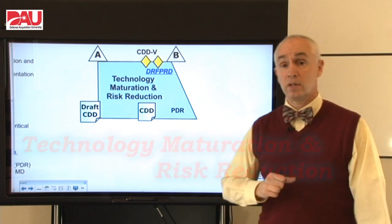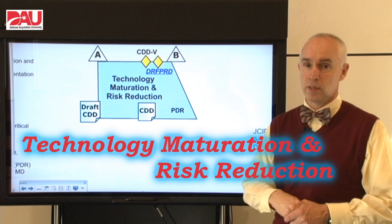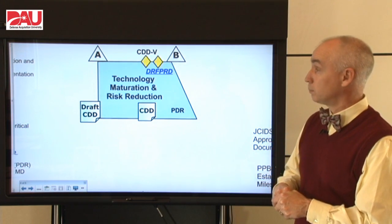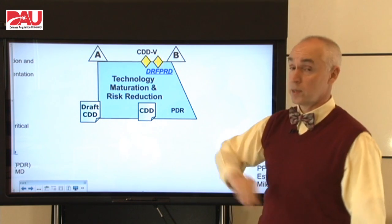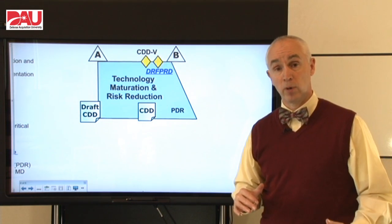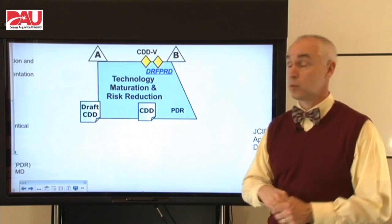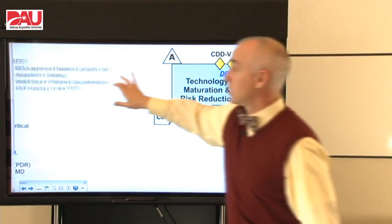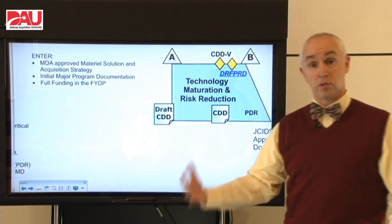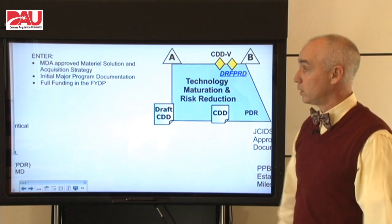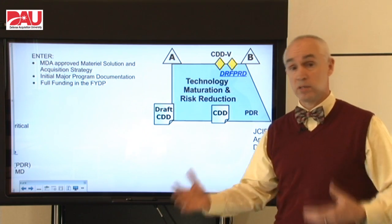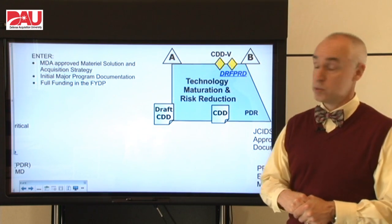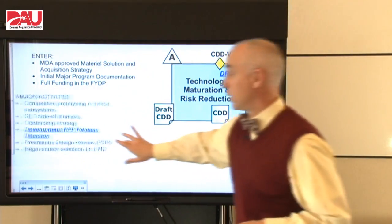The next phase is Technology Maturation and Risk Reduction — that's a new name; it used to be Technology Development. Technology Maturation and Risk Reduction is just what it says: we are maturing the technology and reducing the program risks, generally through competitive prototyping. To get that Milestone A, you need an approved material solution — what's the best technology to go forward with — initial major program documentation like your Test and Evaluation Master Plan, and full funding in the Future Years Defense Program.